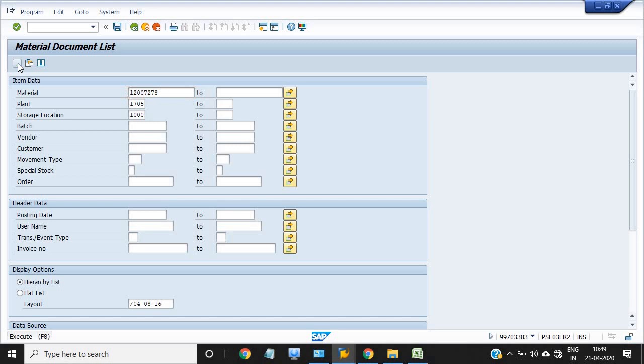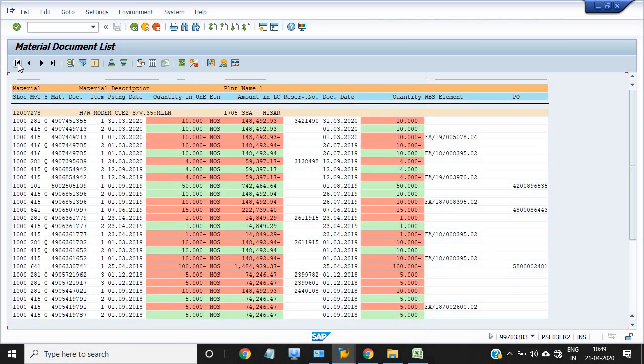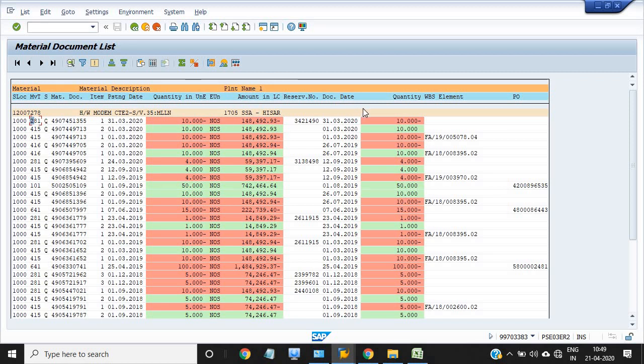See, once I do this MB51 activity, see this document is reflected here in 281 activity. Now this material has been consumed in our network from the WBS to network. I have just reserved those things in the network. Now this material, 10 items, transferred from the project to network.